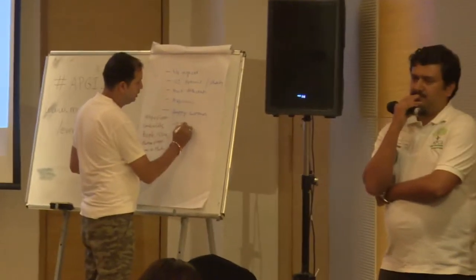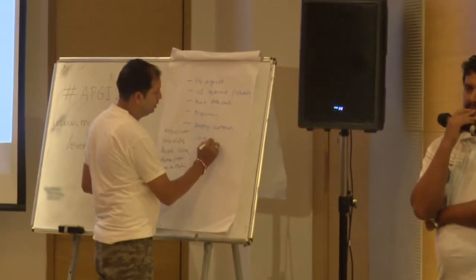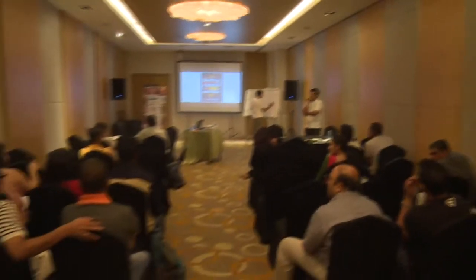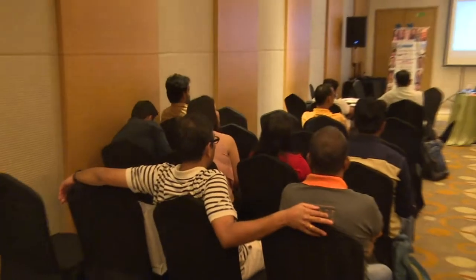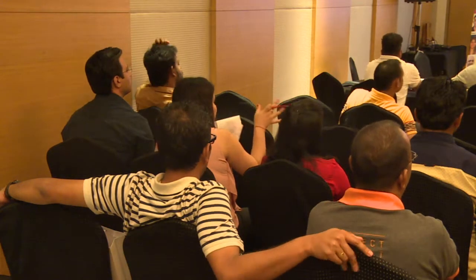Like, when I say that the feature is delivered, when I say about the DoD, it should also consist of the test or the automation test that should be there. Automation test, okay. It should be deployed on the server. Actually, it should be working.